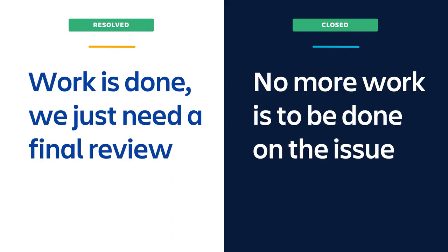An example of when this workflow could be used is when a bug is fixed and marked as resolved, and the tester gives it one last review before marking it as closed. Or in a service desk project, a ticket is resolved, and if a customer doesn't reply to it, it automatically gets closed after a few days. It's safe to say that if your process doesn't have this review cycle, you don't need to keep both statuses.